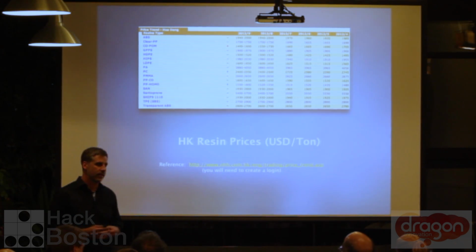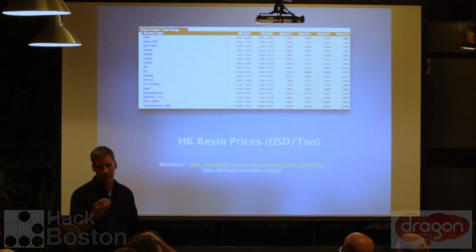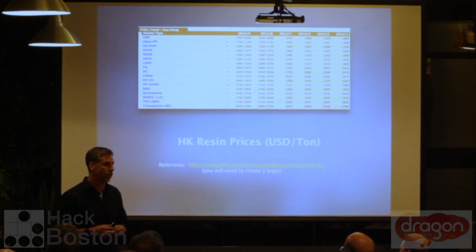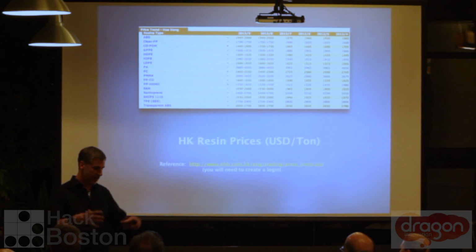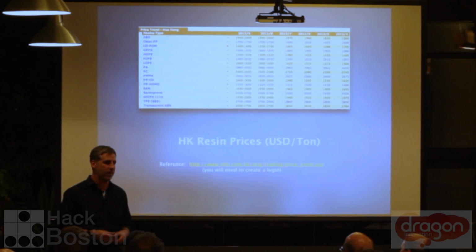You're building an enclosure, you have two clams that lock together? Yeah, so for this mold, not knowing what's on the inside, but let's just say it's a simple clamshell out of ABS, I'd expect that'd be about a $4,000 to $5,000 tool. It's usually, as a really super rough rule of thumb, a quarter the price in China compared to here. But it totally depends on the part. A top shell of something like this with a hot runner is probably $15,000, and that's a pretty big part.